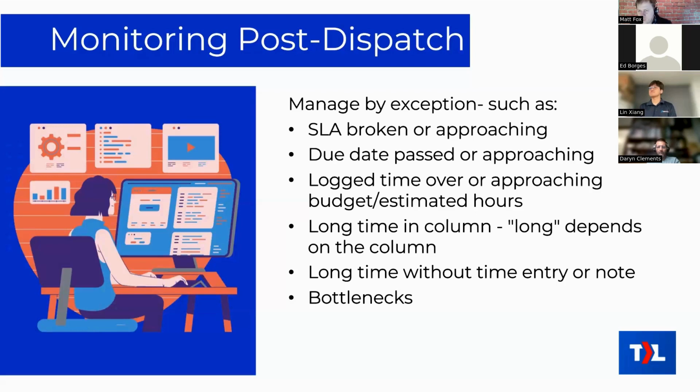So that's why we want to know where that is. Typically in a Kanban board like this, that would be a column that gets too many tickets in it, or where tickets tend to get to that column and then they stall. So that would be good indications of where your bottleneck is.